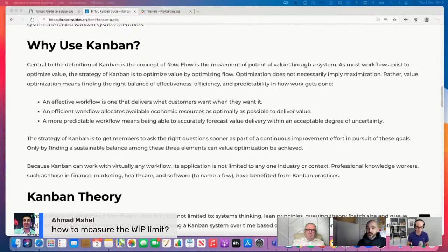Aging is probably the most crucial metric. And that kind of attention, when I was talking about that kind of focus, for me, drawing that focus onto the age of work in progress is going to give you that idea of WIP limits, right? And where you should be paying attention, because if you're pulling more and more in, your age is, I'm going to say potentially, I'm going to sit in the camp of probably more likely, going to get longer and longer, and so that's where the strategy lies.